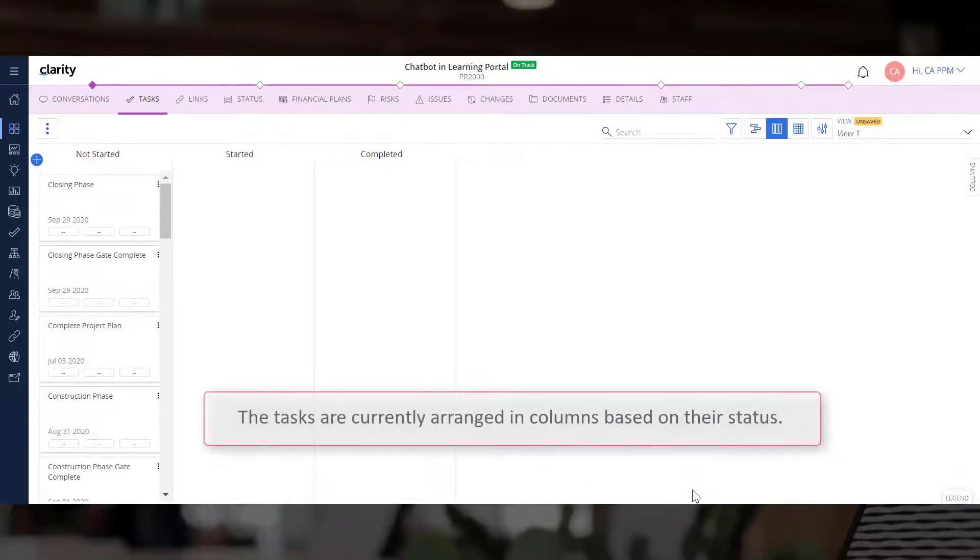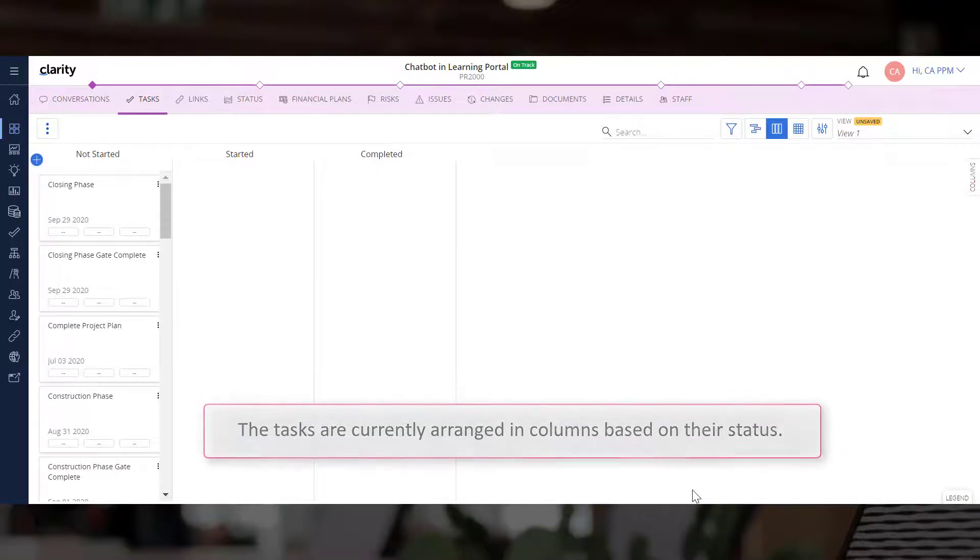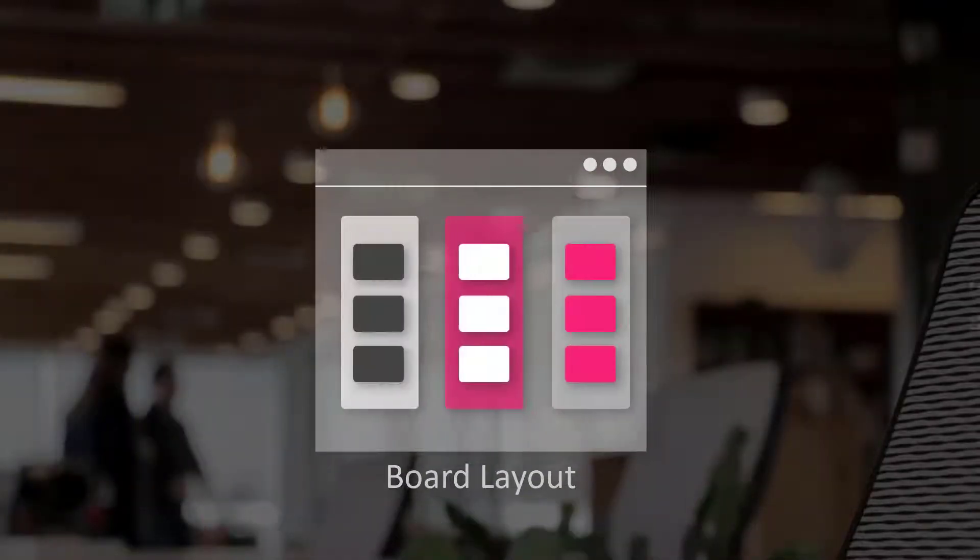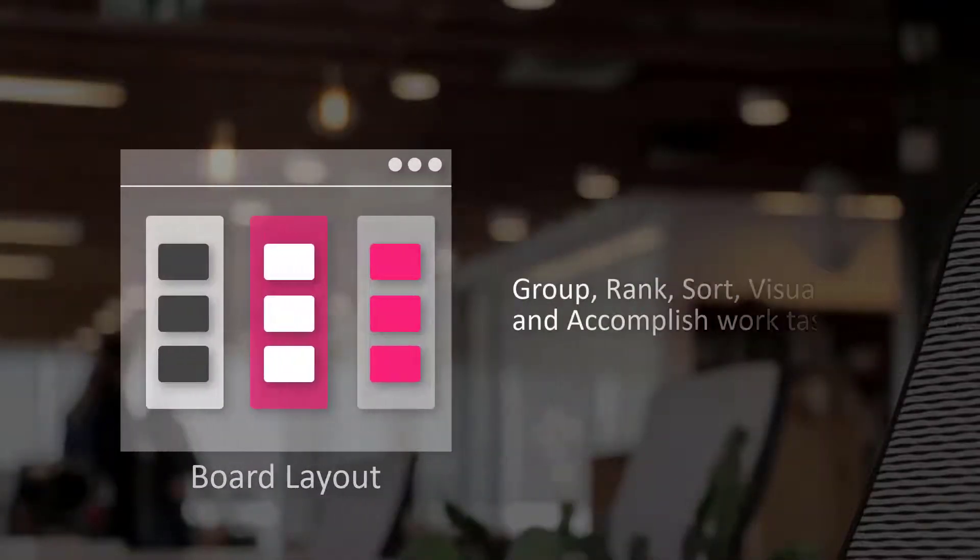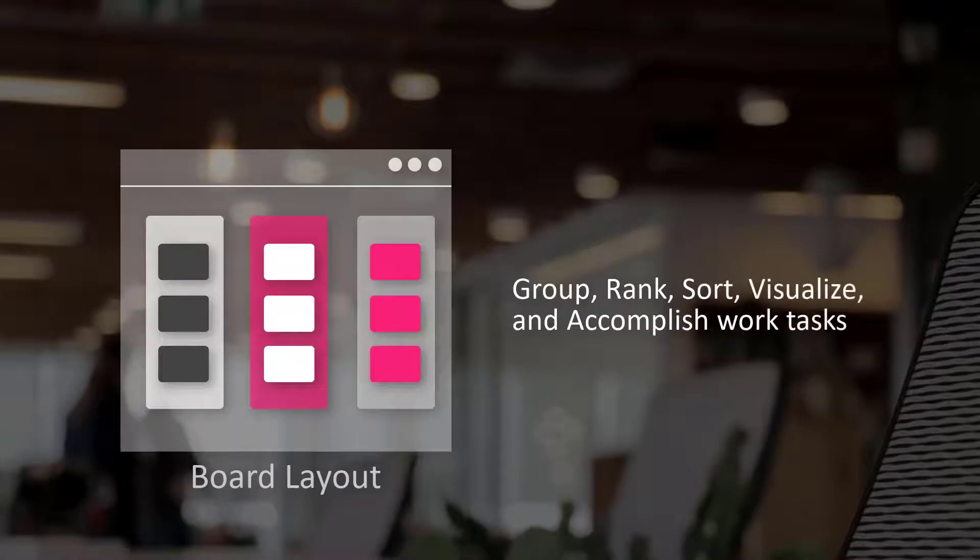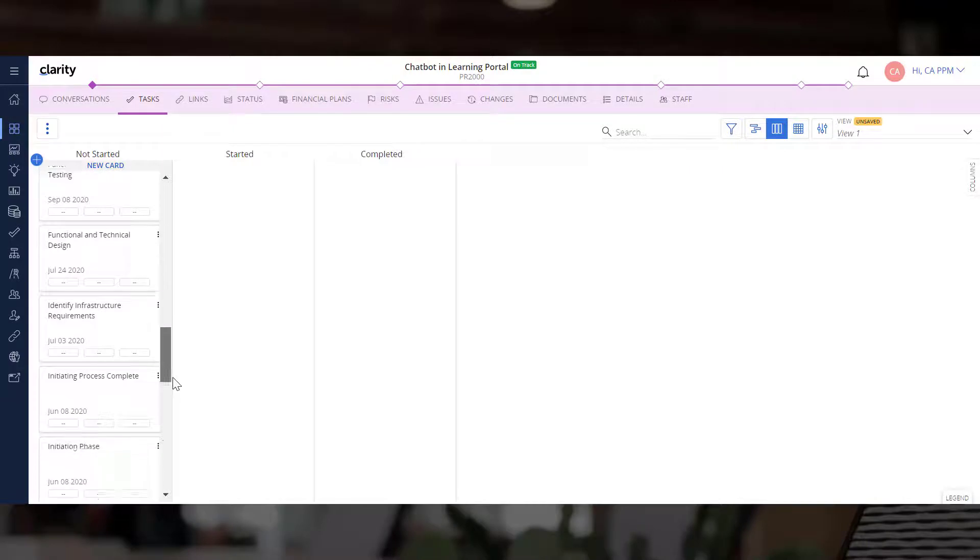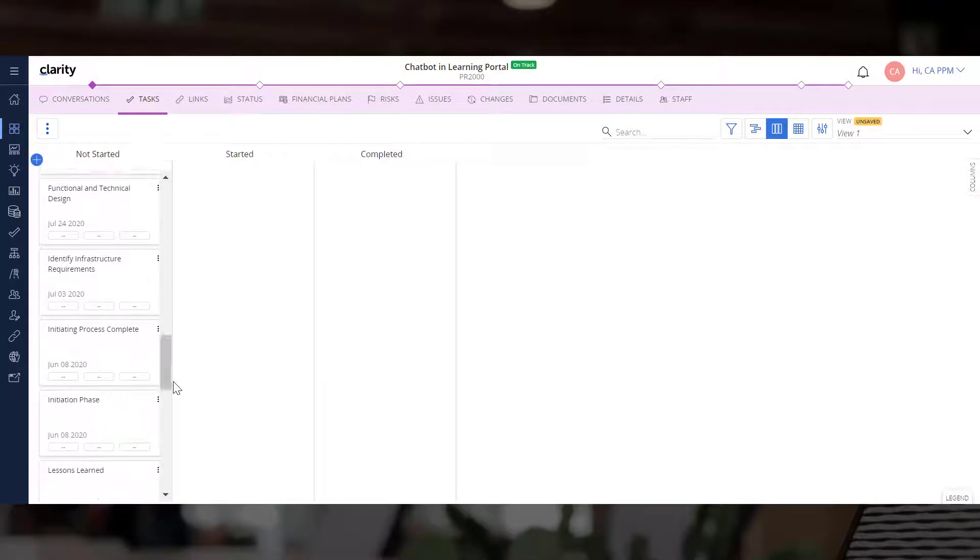The Tasks are currently arranged in columns based on their status. We can use the Task Board to group, rank, sort, visualize, and accomplish work tasks. Let's move a task from the Not Started column to the Started column.